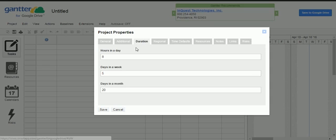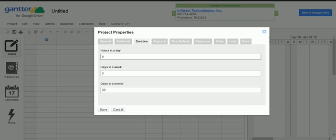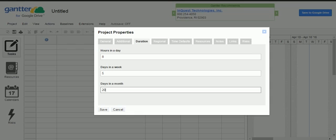Then there is Duration. When working on this project you need to set the duration — like how many hours you are going to work in a day, whether you are working seven days or five days a week, and how many days in a month. Based on your project, whether resources work eight or ten hours daily, and if it is a critical project you may need to work seven days.